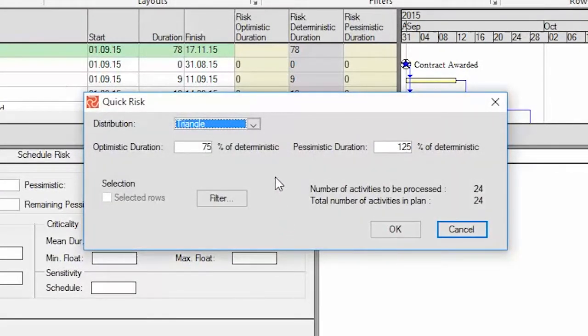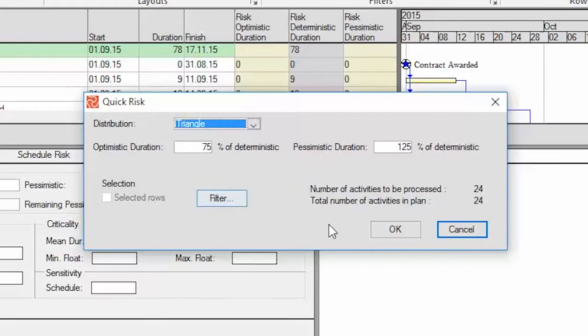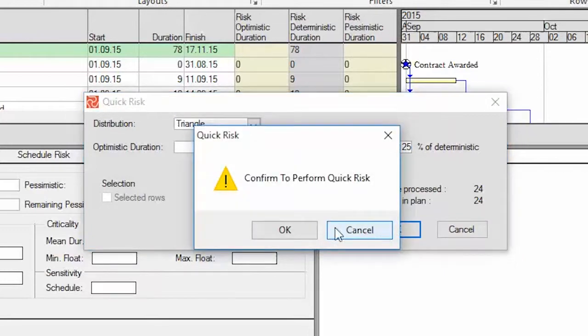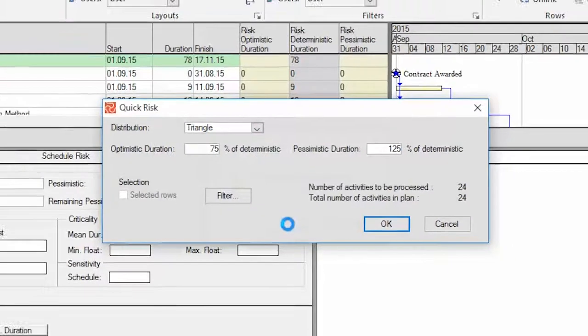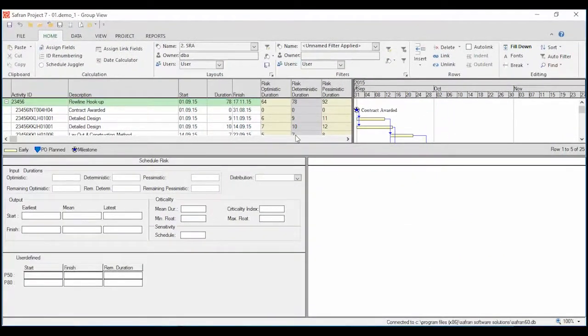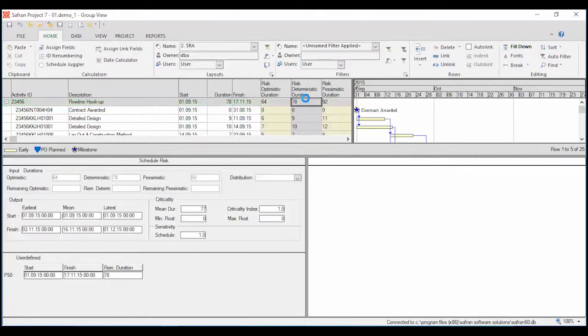Quick risk contains a filter option which allows you to apply a selection of activities if you have a large project with thousands of activities and you just want to run a quick risk on a small part of it.